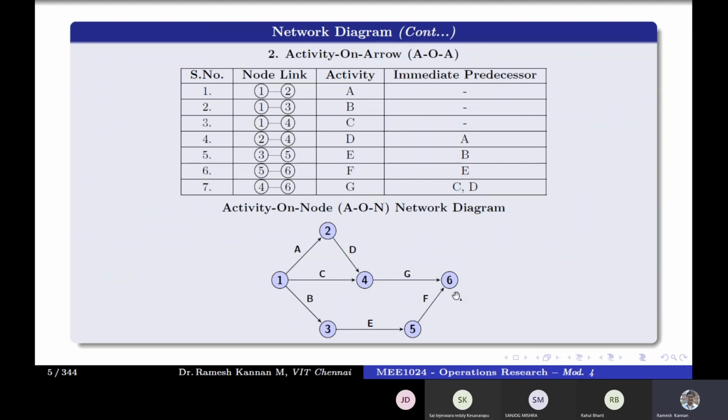I'll give you a construction example. When they dig the earthwork for constructing the foundation, they create the initial schedule saying dig the ground so that they can pour concrete and build the foundation. But unfortunately, during the monsoon, if there is heavy rain and the trench gets filled with water, then there is a process to remove the water called dewatering. That may not be applicable in most circumstances unless it is monsoon, or it is raining. So that particular process is called an optional process.